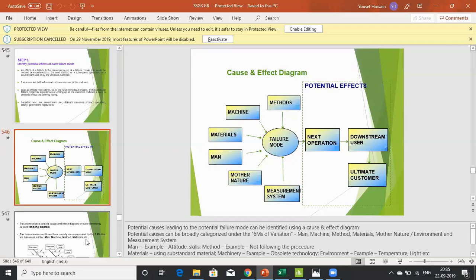Second, we come up with a list of potential solutions based on the brainstorming activity that we do. And against each of these solutions, again, we should do an FMEA. For example, if I implement this solution against this activity, what are the ways in which this solution can fail? So we are doing a risk assessment with the FMEA tool, so that upfront, before implementing anything, we identify any kind of failure that can happen to a particular solution.